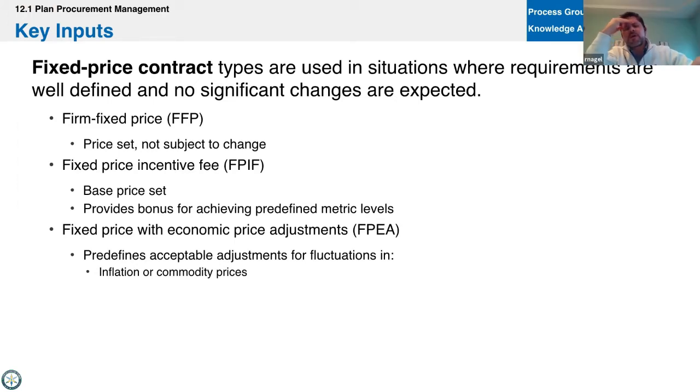I've had cost plus contracts where if you exceed the initial estimate in cost, you share in those additional costs with the buyer at a predetermined ratio. So if I think the costs are going to be $100 million, and costs end up being 110, that additional 10, we share in those costs at some predetermined ratio as well on the cost plus side. Okay. Do you have a ceiling price? Not on cost plus, no.